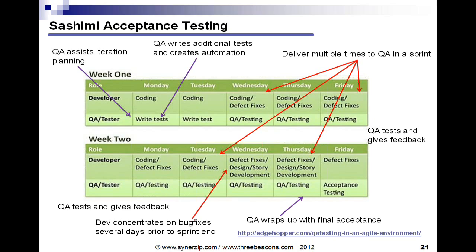For example, there may be an end-to-end functional slice that says, okay, for us to call this done, it must satisfy the following 5 acceptance criteria. Maybe the software developers have got it to a point where it already satisfies the first 1 or 2 criteria. Absolutely. Let your QA person run with that and confirm whether or not it satisfies those. And through talking about the remaining 3, the QA person can go ahead and lay in the groundwork for the automation of what's remaining there.